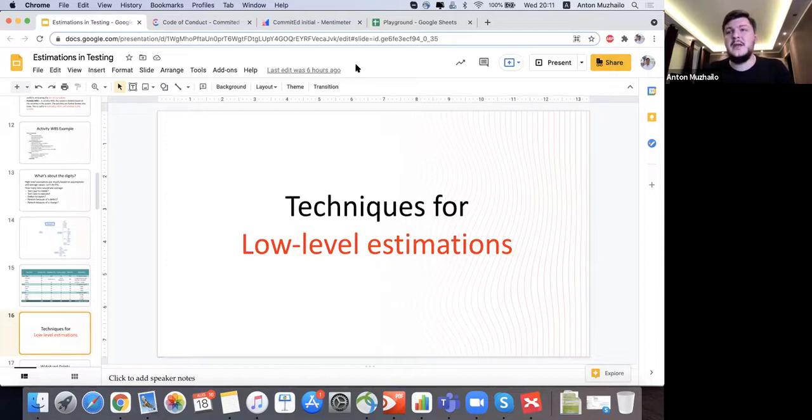Just contact the person and say, hey, what do you think? How long would it take? If the person says, I don't know, you say, okay, minutes, days, hours, weeks? The person says, okay, days. How many days? 5, 10, 15, 1, 2, maybe 2 days. See, when you're not asking just an open question, how many, but you provide a list of options to answer, usually people provide a better estimation.